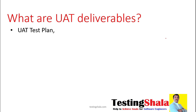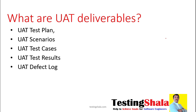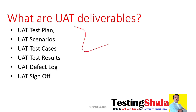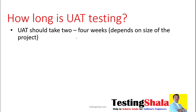What are the key UAT deliverables? The first is the UAT test plan, where overall test planning activities and test strategy are defined. The second is UAT scenarios written based on user stories, followed by test cases. Executions are done, defects are logged, and finally the UAT sign-off is also a key deliverable as part of UAT testing.